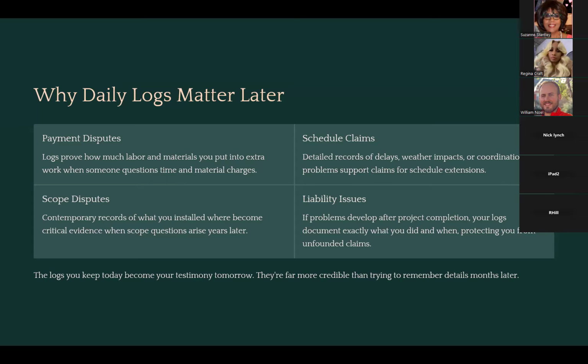Some general contractors, or every general contractor, will be doing their own daily log about what happened on the site in totality. But it's very highly recommended that you, as a subcontractor, do your own daily reports to make sure that you are capturing what you did, because it may be slightly different than what the general contractor said. Some general contractors require you to turn in a daily log to them. Some don't. Even if they don't, I still encourage every subcontractor I work with to keep their own daily log reports, again, for their own purposes here.